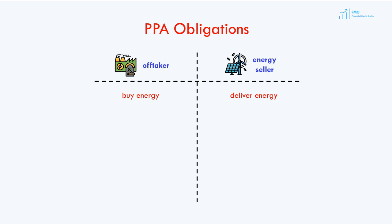The PPA, however, includes additional obligations apart from energy purchase and sale, especially for the energy seller. Since the project will be built from scratch, the energy seller will also be responsible for obtaining all necessary permits and land for the project.